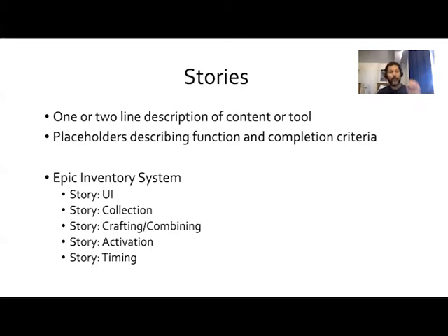You're not talking about creating those little elements. Those are tasks. So your epics are your big feature level components of work. That's what we're asking for right now. Stories are the components of that epic that you need to have in order to build that epic. The tasks are all the individual things you need in order to make those stories.